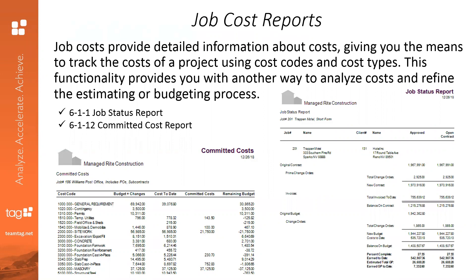A couple of the widely commonly used reports are the Job Status Report and the Committed Cost Report. The 6-1-1 Job Status Report is a great snapshot of how your jobs are doing — it shows the original contract, any approved change orders, your new contract, what's been invoiced to date, your new balance, cost to date, change order costs, and your new budget at the bottom.